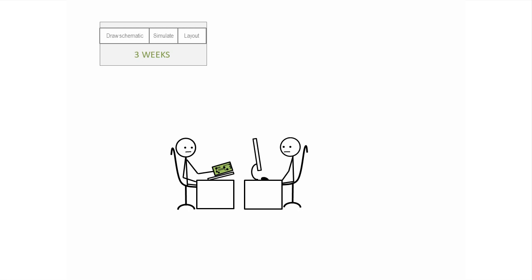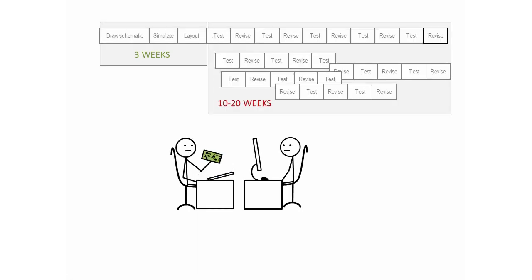So given that 10% of our time is spent on design, and 90% on troubleshooting, maybe 18 to 20 weeks for a complex electronic product looks a little more reasonable.